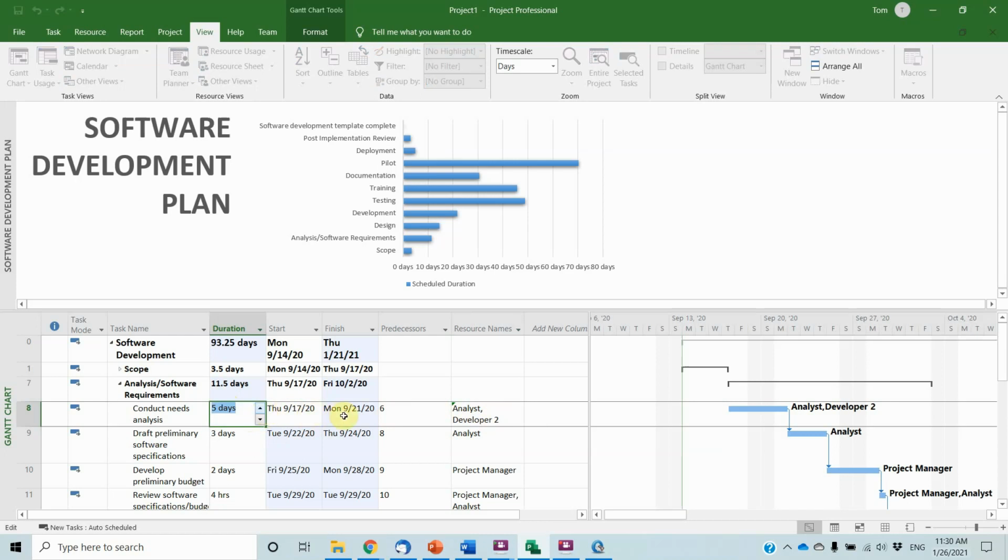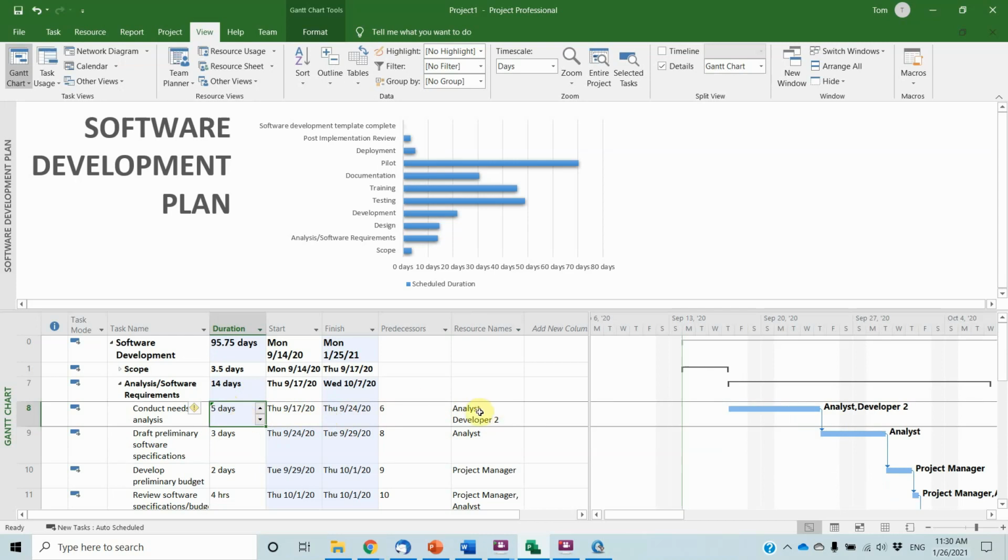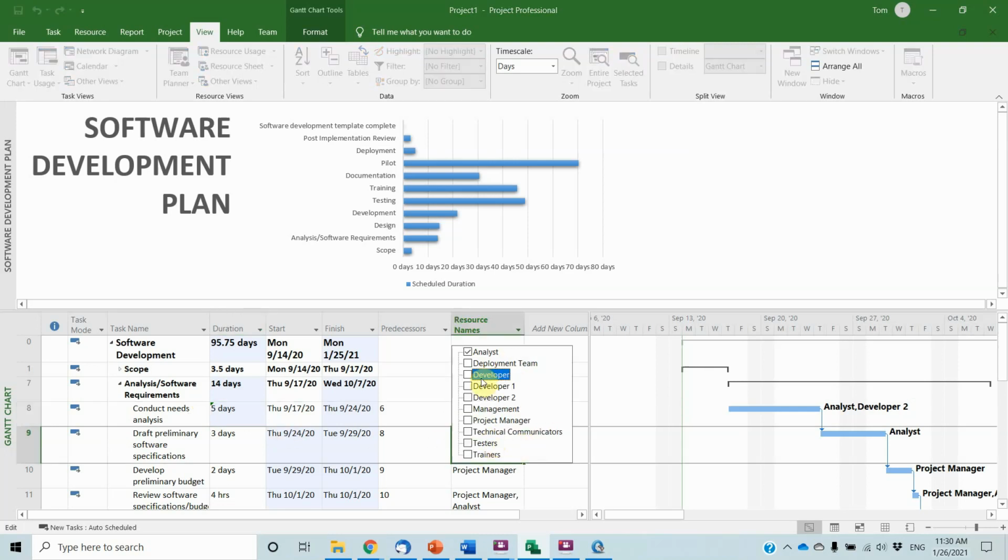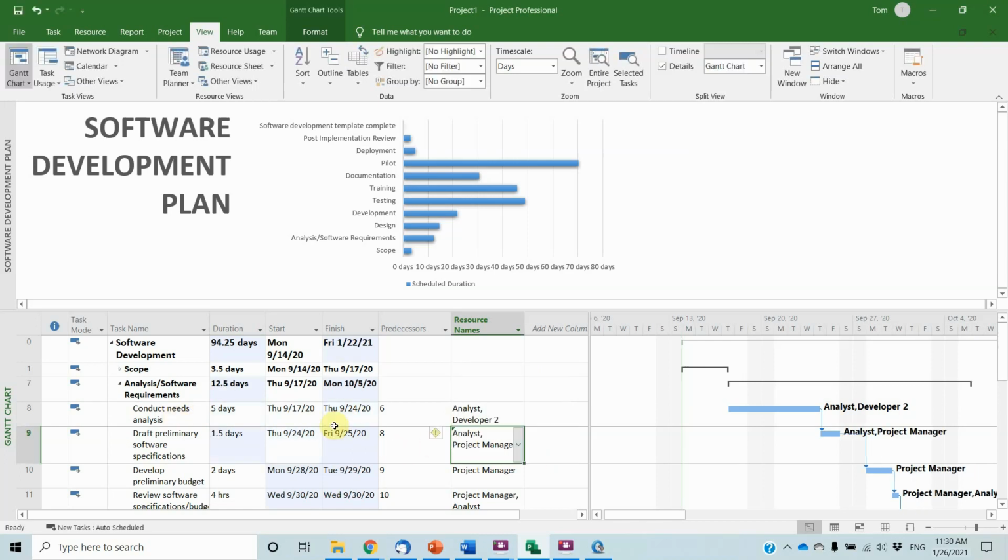So that's how you massage your cost. For each task, you assign more than one person. When you assign to more than one person, please keep in mind do not overuse them and do not underuse them. You have to use them just right, so that everyone gets a full-time job to do. And when you assign to more than one person, still keep the original duration. So that's how.